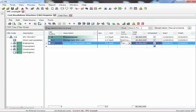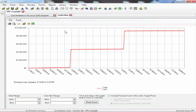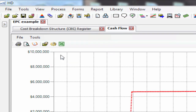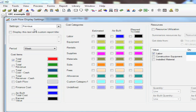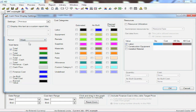As we start to look at our projected cash flow, let's change these to front loaded to give us a more realistic view of how that's going to be. Now when we go to that cash flow, we can see those costs ramping almost straight up as they hit the storage tanks coming in, then the pressure vessels. The other thing that we can do is go in and look at what our earned value looks like and what our as-built cost looks like. So with version 11, we've added these new graphing capabilities.